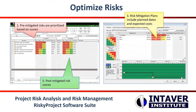Optimizing risk should be the first step after your analysis. The risk register can be sorted based on pre-mitigated or unmanaged risk scores, and the highest priority risks should be managed first. If you are going to mitigate a risk, mitigation plans can be plotted on a mitigation waterfall chart.